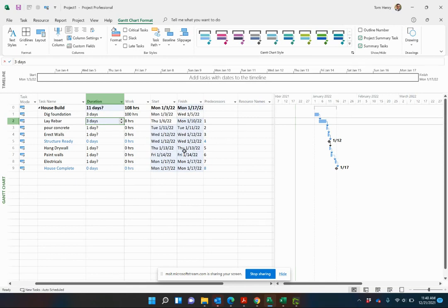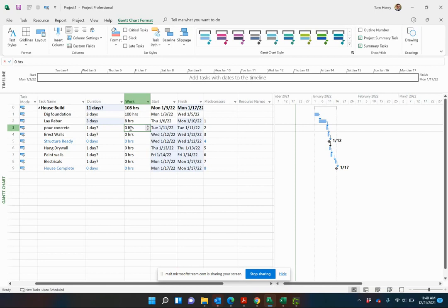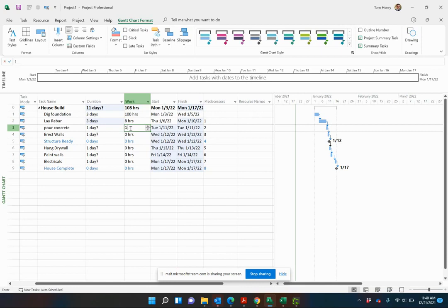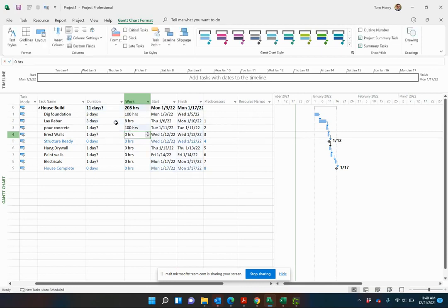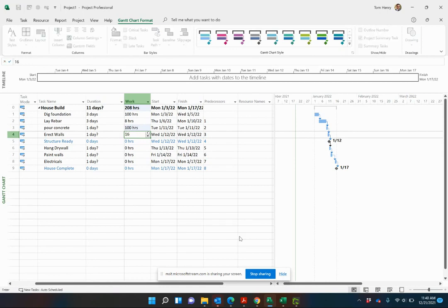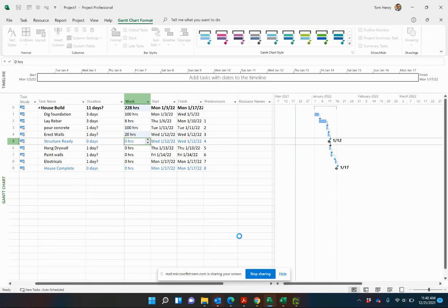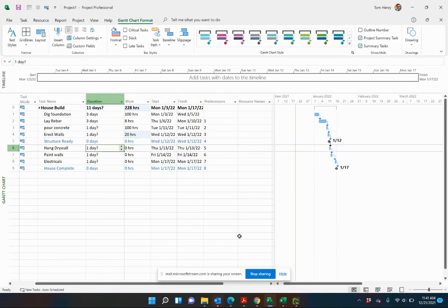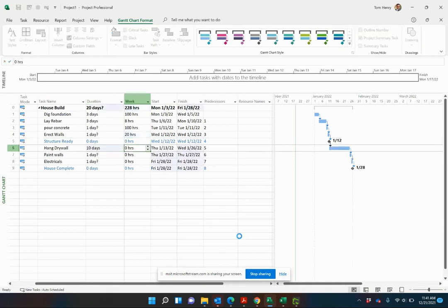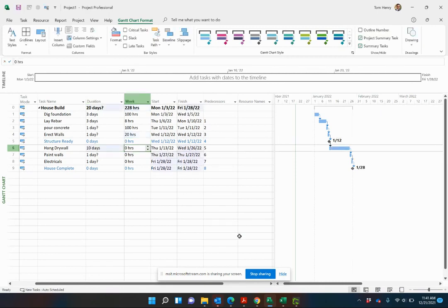Got a little bit of work going on over a longer duration. This is the real world. It's really important to come in here and estimate not just the duration, but how much effort is involved. That's going to affect everything from how many work hours we have to how much it's going to cost ultimately. Pour the concrete, that only takes a day, but it takes four or five different people to do it. Overall, it's about 100 hours of effort across the team. Erect walls, just one day, but there's a crew of two. We'll call it 16 hours, maybe 20 hours. This is a milestone, zero duration, zero hours of work. And the drywall, let's say that's going to take 10 days and 40 hours.